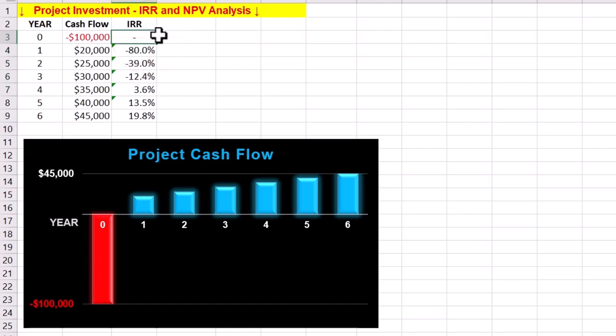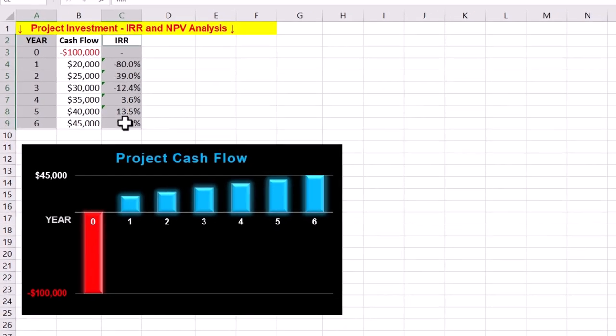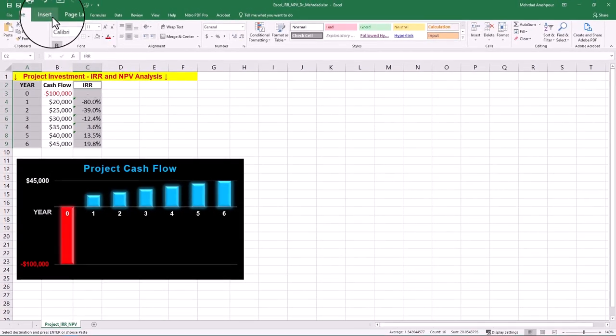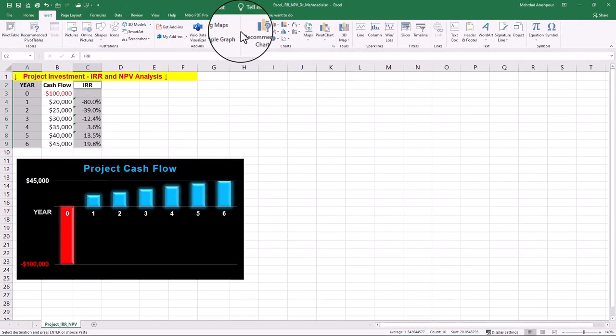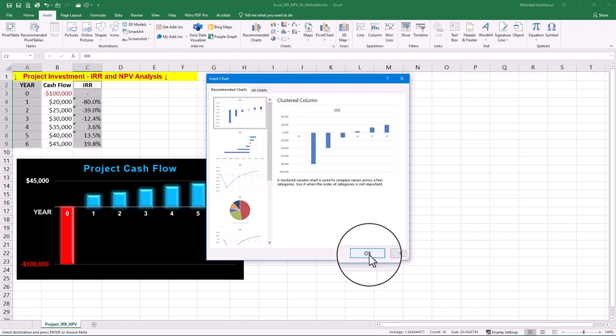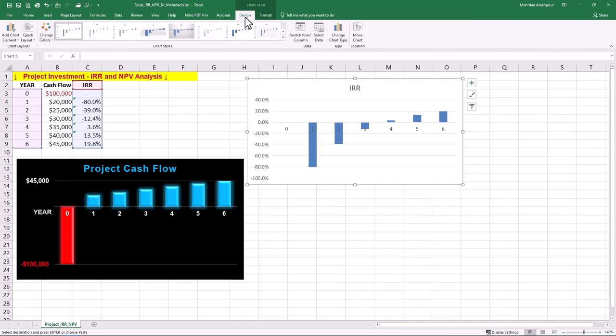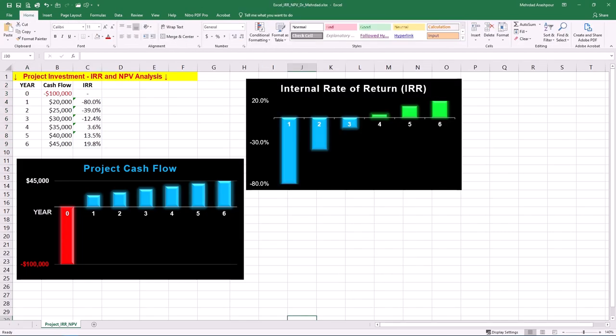It's important to note that IRR cannot be calculated for the initial investment at year 0, because the input array must contain at least one positive value and one negative value. To plot the IRR chart, select the two columns of year and IRR, then navigate to the insert tab and recommended charts. A clustered column graph is a good recommendation. You can adjust the year range and modify the style to suit your project management routine.